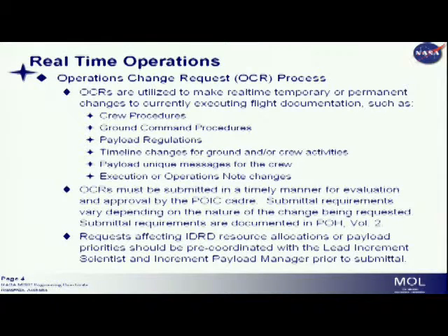We do need you to submit that paperwork prior to your scheduled operations so that it can be appropriately reviewed and dispositioned and products updated and put on board. We do request, however, that if you are going to ask for more crew time or more resources outside or above and beyond what's documented in your IDRD, that you go ahead and pre-coordinate that with the lead increment scientist and the increment payload manager before you submit that OCR.